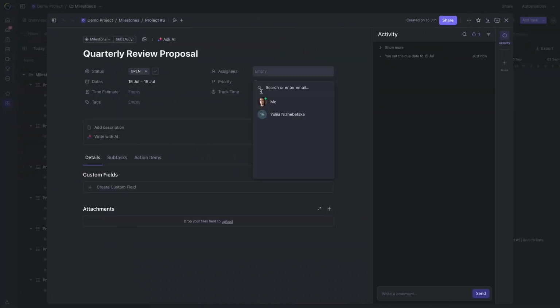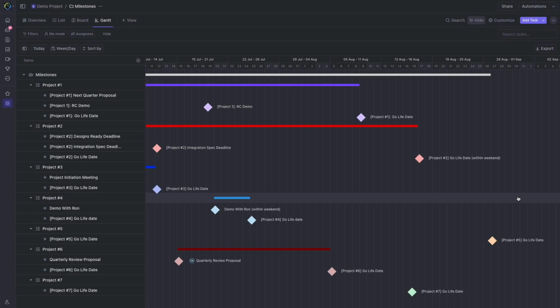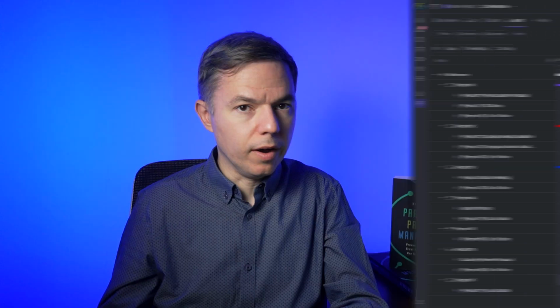So, when I looked at the milestone chart on a strategic level, I realized that I could assign whole deliverables to some team members. So, as the second step, I started with internal, mostly technical deliverables and fully delegated them to one of the senior level developers, including communication with customers and internal stakeholders. Obviously, this delegation didn't happen magically and automatically. You do need to properly delegate, educate, empower, and support these developers. So it's a long-term investment. Nevertheless, it had a tremendous effect on my workload.